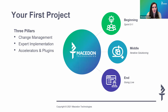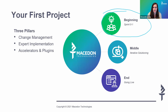Change management — I like to coin it as the people side of change. It's a lot of planning and assessment right at the beginning, creating plans. The first really important part of change management at the beginning is sponsorship. You really want to have an individual identified as someone who's going to champion this change within the company — someone who gets people excited, spreads awareness, and is really just going to be there to advocate for it. They're easy to get in the beginning, but it's hard to keep them throughout the project and keep that level of enthusiasm really high.